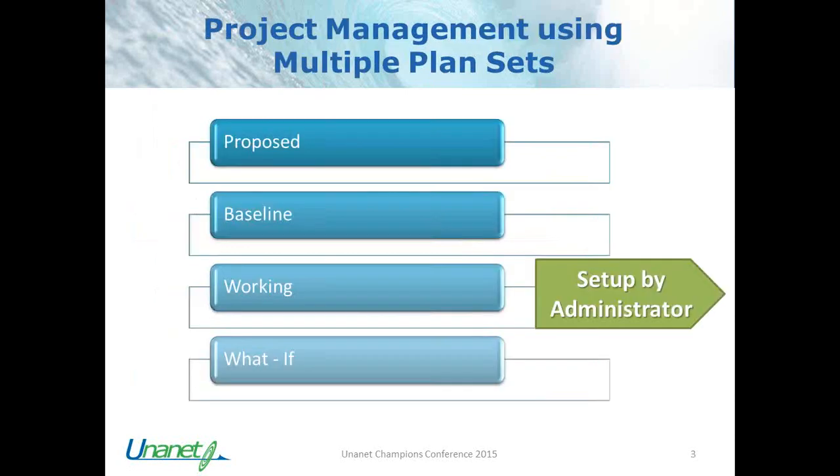Multiple plan sets does need to be enabled by a property setting by the administrator. In addition, in this scenario, we recommended 4 different types of plan set names to be defined under the admin setup. Propose, which is just what it implies, is a proposal of costs associated with resources and expenses associated with a plan set. So a plan set is that soft booking of resources and expenses to a project.